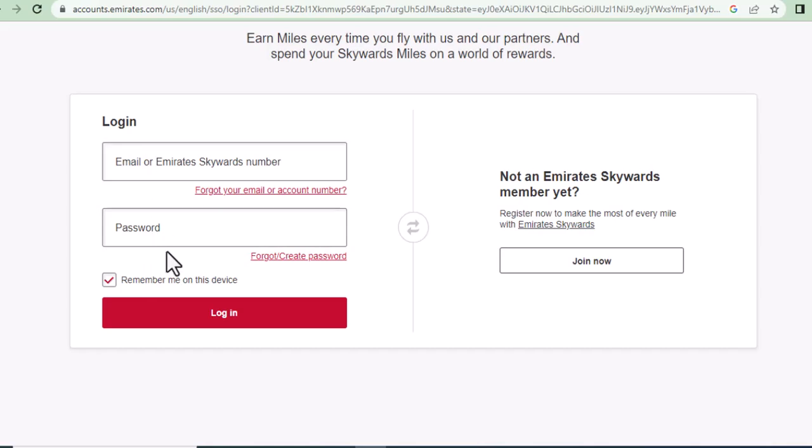All this testing is done in the UAT environment. Members are dummy members, email ID is a dummy email ID, password is dummy, and we are testing it in the UAT environment. Once you get the UAT sign off, the developer will move the code to production, and it will be ready for the public to use. So that is user acceptance testing.